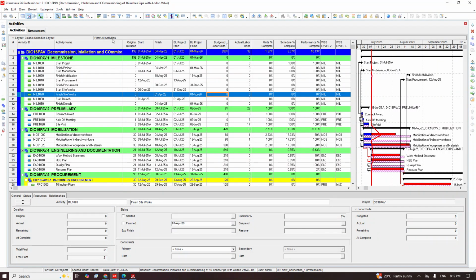Make sure you are working at the level 1 WBS. So if you do this division, automatically multiply it by 100. If the value is up to 1 and it's still not coming out, this is where you should be bothered. I don't know if you can quickly do that, and let's look at it. If it's up to 1 and it's not coming out, then it means there's a problem. So we can move over to the second solution.